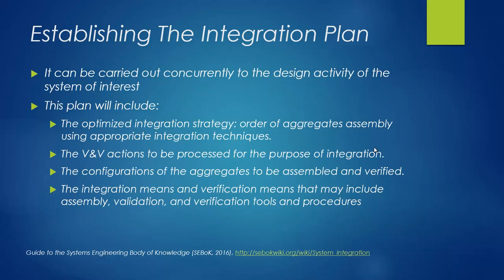Once we define the technique or mix of techniques used in the integration process, a plan can be developed to include the optimized integration strategy, which is the order of the aggregates assembly using appropriate integration techniques.